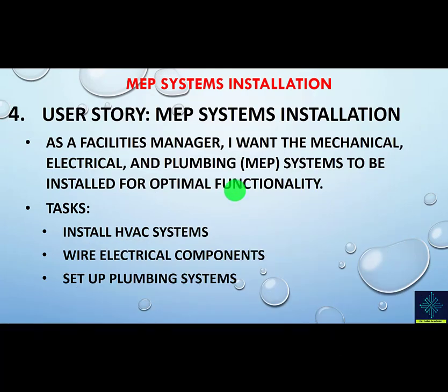One more user story related to the MEP systems installation. This is narrated by the facilities managers. The facilities managers say that I want the mechanical, electrical, and plumbing, or the MEP systems, to be installed for optimal functionality. Tasks included might be install HVAC systems, wire electrical components, set up plumbing systems.